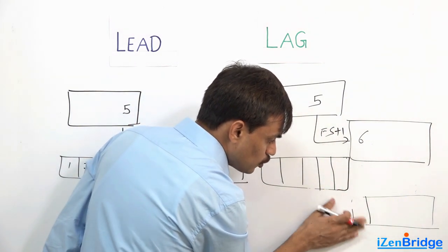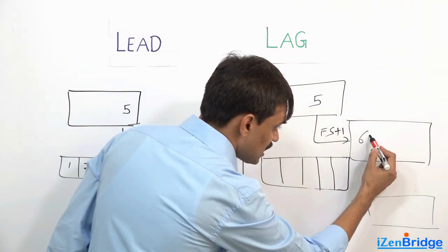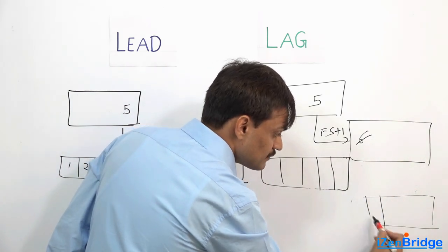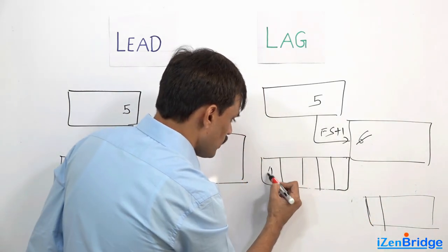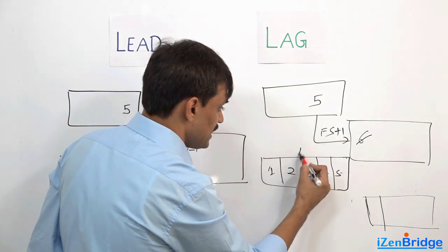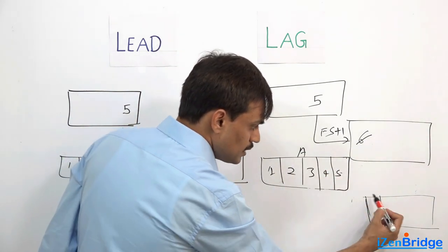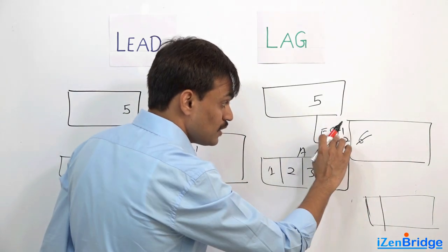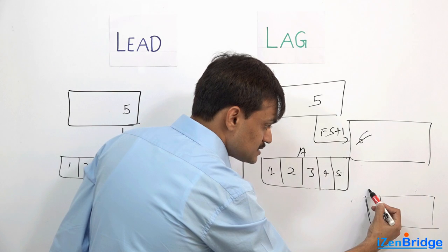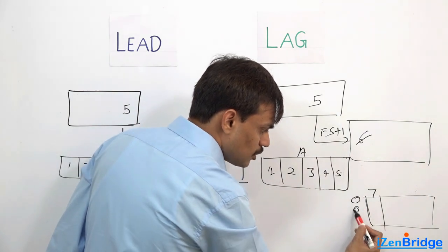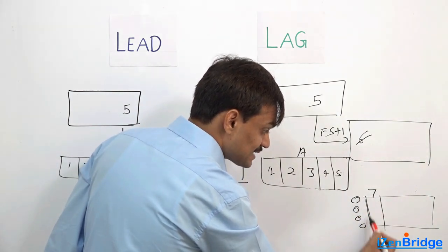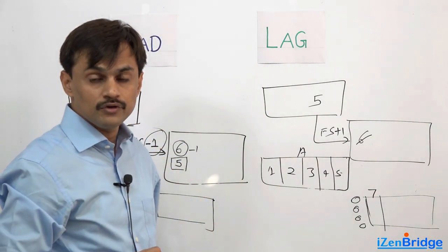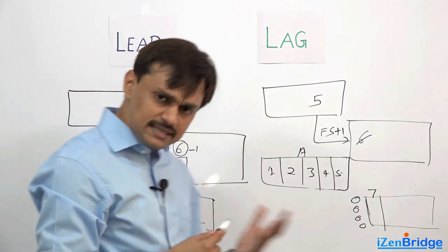But if I say FS plus one, it means I want to lag it by one day. So I just remove this one day, nobody will work on it, and I will start from day seven rather than from day six. So what happened? Day one was working, two, three, four, five - activity A was working there. And activity B was expected to start on six, but you have a lag of one day, then it starts on day seven. Nothing happens on day six, so it's a slack time you added that day where you need to wait for it. We call it lagging.